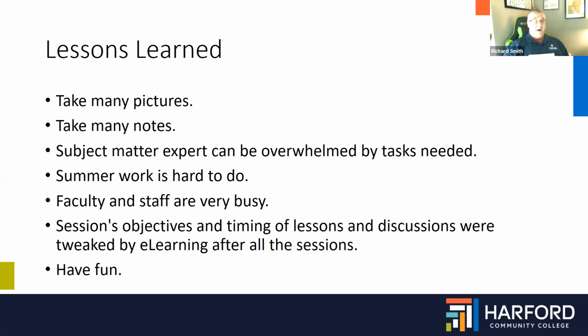We did find after the fact that the subject matter expert, which was mainly John Donahue, our sociology and anthropology instructor, ended up being very overwhelmed by tasks. And when we talk about our virtual one that we did this year, we broke the subject matter expert role up into multiple people, because poor John, who was the main subject expert on this, after the Institute had more work than anyone else.